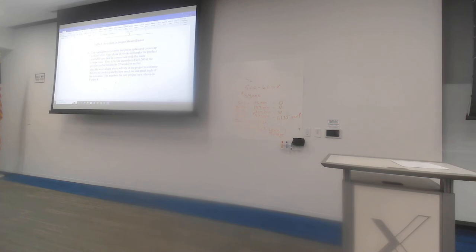The numbers for the project are shown in Figure 4. So we have unit crashing costs here for the normal duration, and if we crash, what happens as a result of that? What kind of speed do we gain? What's the cheapest way of reducing the project duration to 25 weeks, and how? Do we take the offer by management?